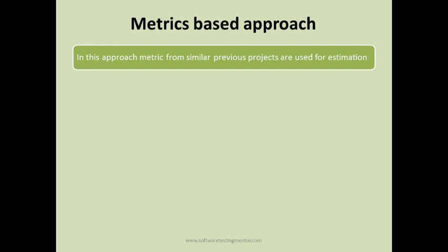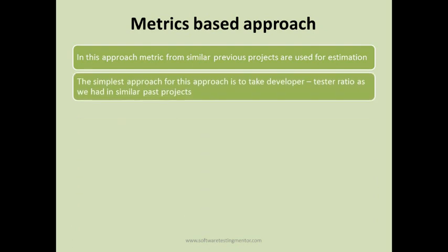In the matrix-based approach, metrics from similar previous projects are used for estimation. For example, if phase one of a project has ended, you use those metrics to estimate phase two. The simplest approach is to take the developer-to-tester ratio — for instance, if the previous phase had a ratio of 3:2, you can apply the same ratio in the current phase. However, this is the simplest approach and doesn't give you a proper estimation.